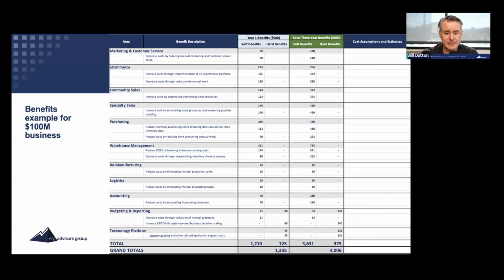But what we do there is we say, okay, marketing and customer service has 10 people. And by creating a new customer service application where the data is easier to access, where they can put in a ticket, where they can find out what problems other customers have had, kind of like Zendesk-y customer support type applications, right? You got maybe 10 people, you figure out what an hourly rate is, fully loaded, you just guess $40 an hour, that's 80,000 a year divided by 2,000, and then times 12, right? You can come up with a number here, and let's say we save them 2 hours a week. These numbers are pretty easy to find that way.